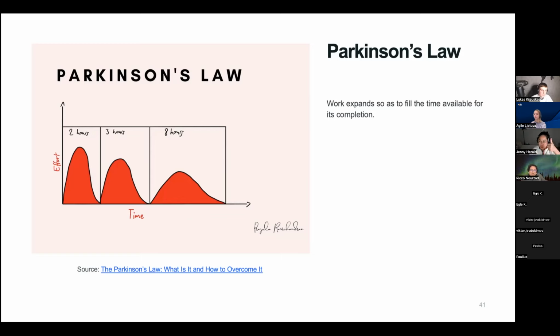And the answer is no, don't do that. Look at it and see if this is something you start, stop, or continue, right? And if you continue, do you move the goalpost a bit further? And a lot of teams will do that until they are satisfied, at which point you upgrade your OKRs into a KPI, because now it's literally a part of how you do business, which is how they play together.